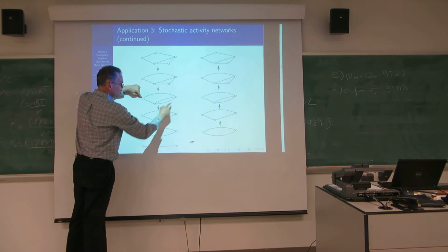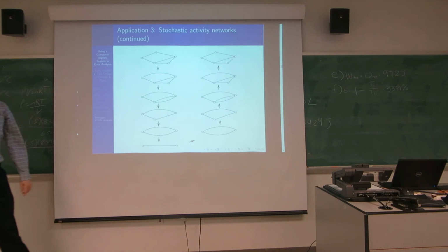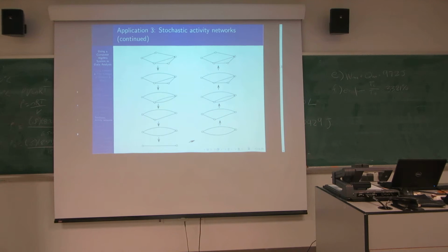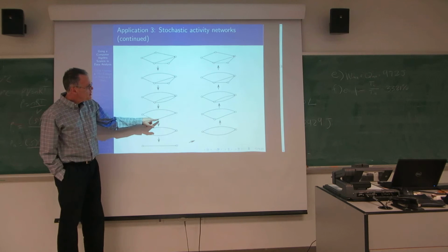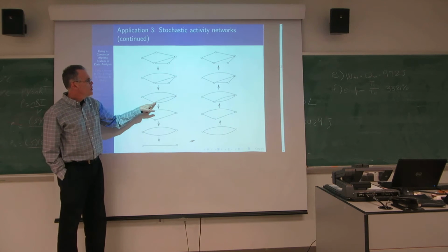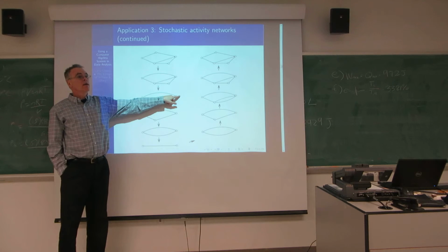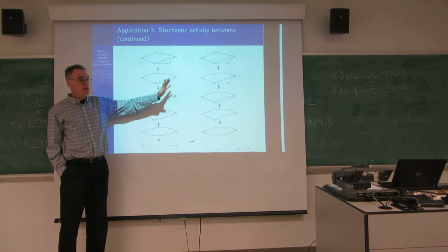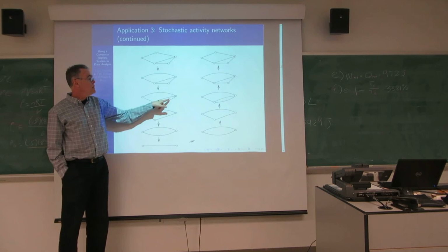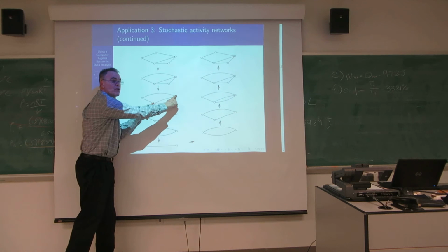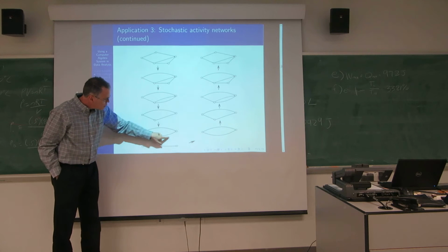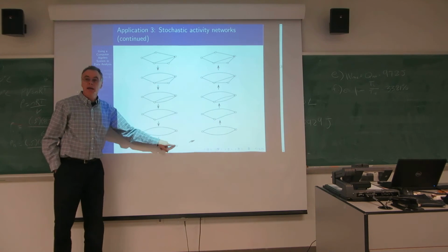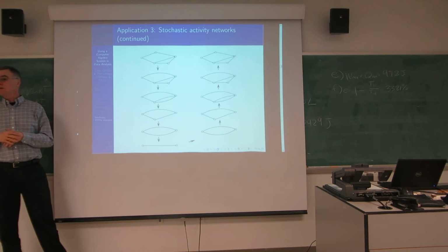When we take these two arcs and we reduce them to a single arc, what's the operation there? How long does it take me to get from here to here in terms of those two arcs? Minimum? It's actually maximum, but your thinking is right. It's going to be the larger of these two, won't it? Right? Because one will get there first, and then when the other one gets there, then you've completed it, right? So here we have a maximum, and here we have a convolution, and here we have a maximum, and now we've got it down to a single random variable, and that's how long it takes to complete the network.